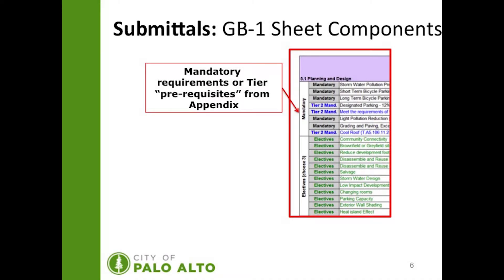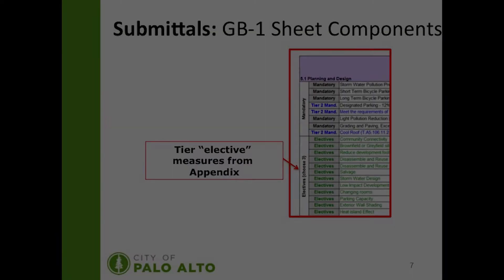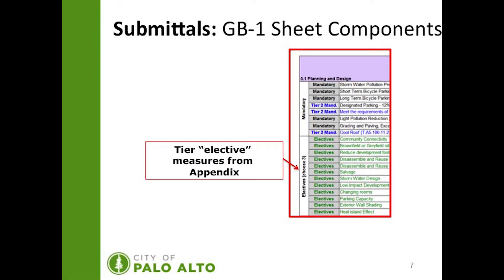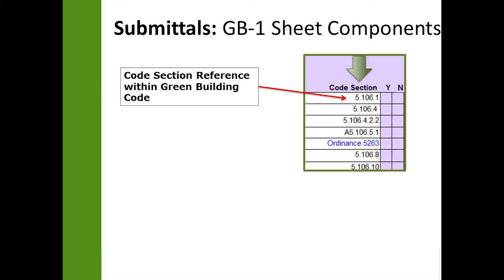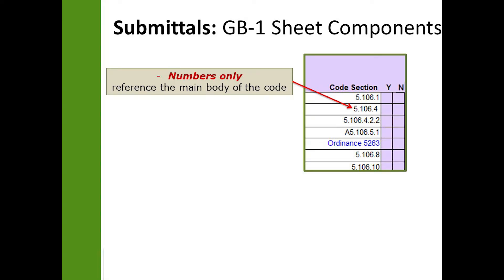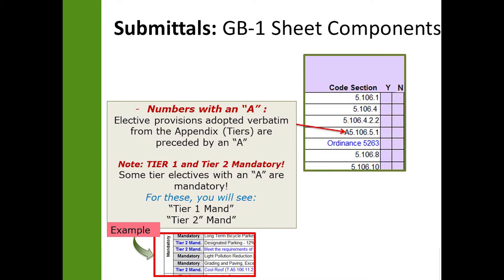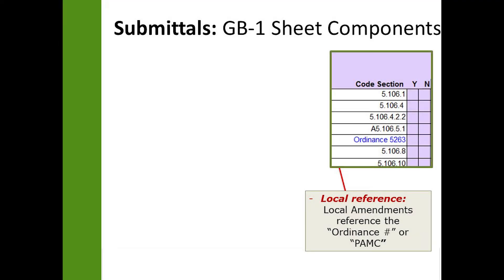The GB1 sheet components show the different requirements for both mandatory and elective requirements. The mandatory requirements or tier prerequisites from the appendix are listed under mandatory. The tier elective requirements are listed under electives and are located in the appendix. The code section reference within the green building code is listed to the right. When there are numbers only, this references the main body of the code. When numbers are preceded with an 'A', that provision is from the appendix. Note that Tier 1 and Tier 2 mandatory requirements also have an 'A', so keep in mind that in some cases items with an 'A' are mandatory. Anything that references a local ordinance will be listed with an ordinance number or Palo Alto Municipal Code.